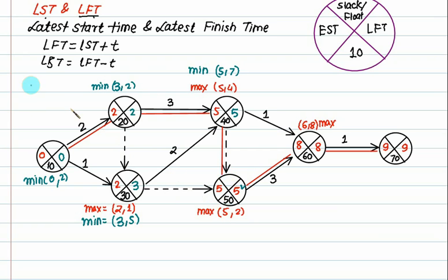Now, wherever you have a double arrow, the number is repeated. So don't do any calculation for those nodes which are connected by a double arrow. Only do the calculation for this one. Is there a double arrow there or no double arrow? No double arrow, so only one calculation is required. The rest you can do blindly: 9, 9, 8, 8, 5, 5, 2, 2, 0, 0. Only one required.